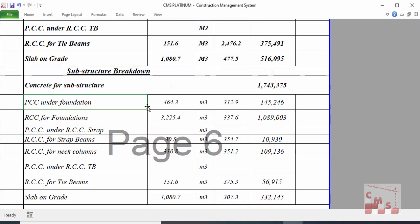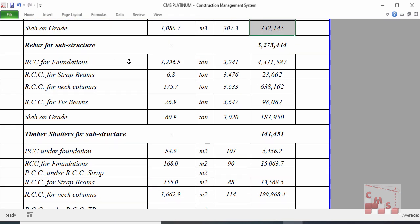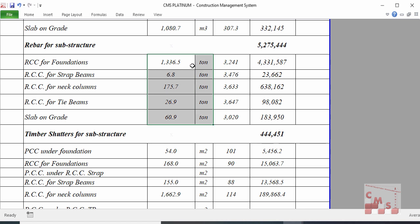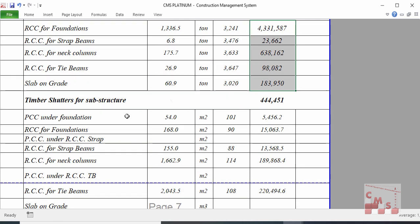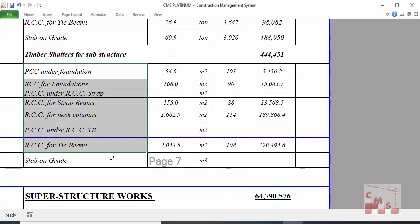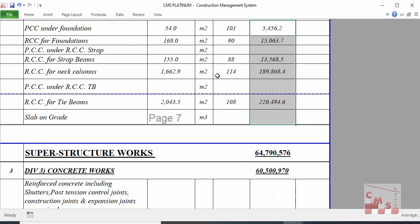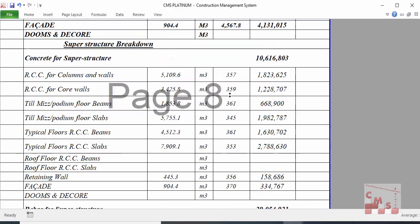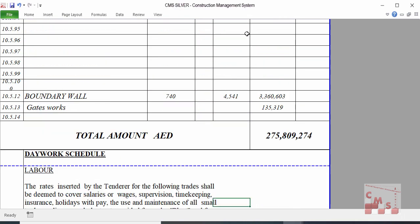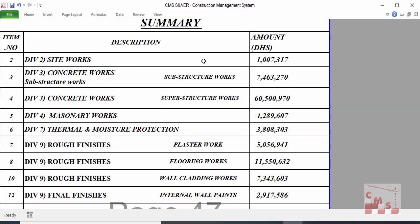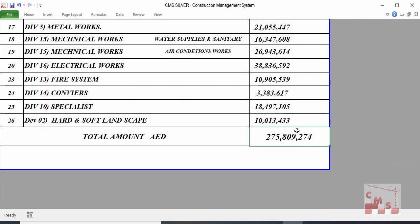The same is found for concrete — CMS gives all elements required for substructure: total quantity, final rate, and final price. CMS also gives a breakdown for substructure concrete work — the rate of concrete itself for each element, the final price for concrete per element, the rebar required for the same elements, the total rebar quantity per ton per element, the cost of rebar covering material and manpower, and the final price for rebar. The same is done for shutters — all required shutter areas per element, rate, and final price — for all construction activities automatically.